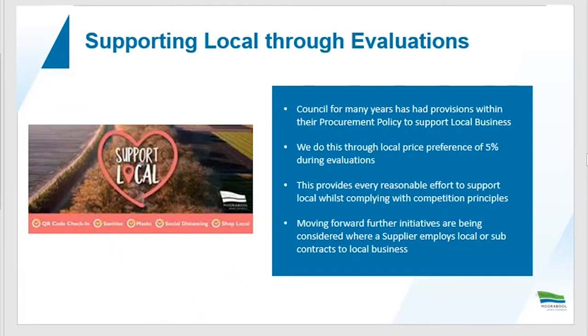So supporting local through the evaluation, as I touched on previously, we have the 5% reduction on the price submitted only for the purposes of the evaluation. And it provides a reasonable effort to support local whilst complying with trade practice and competition principles.